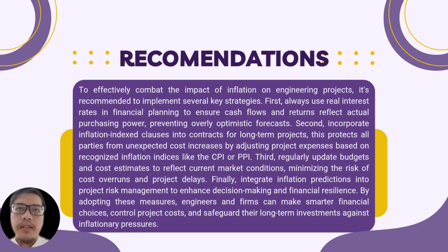It is recommended to implement several key strategies. First, always use real interest rate in financial planning to ensure cash flow and return reflect actual purchasing power, preventing overly optimistic forecasts. Second, incorporate inflation index clauses into contracts for long-term projects.